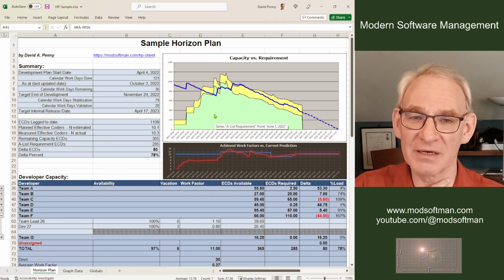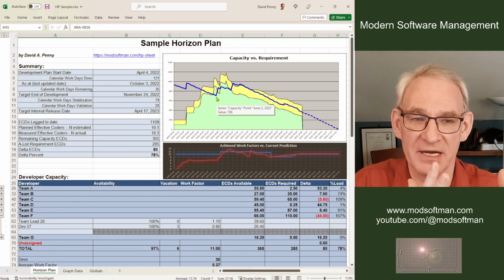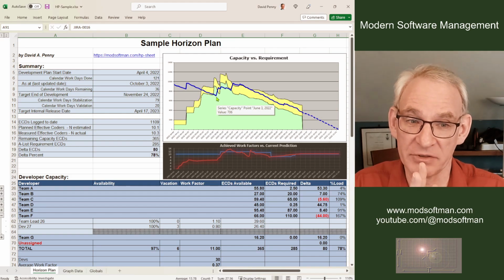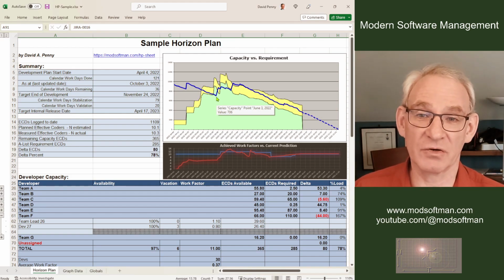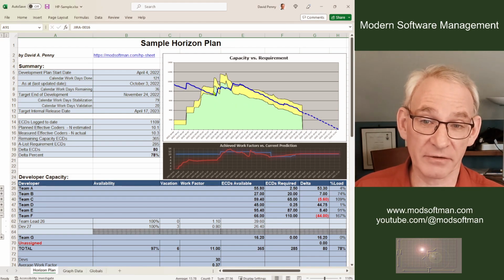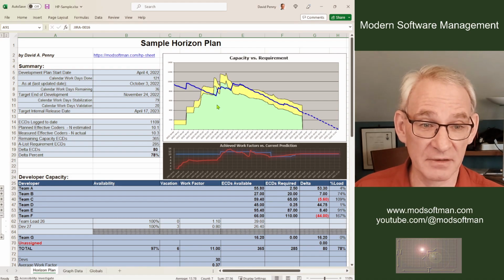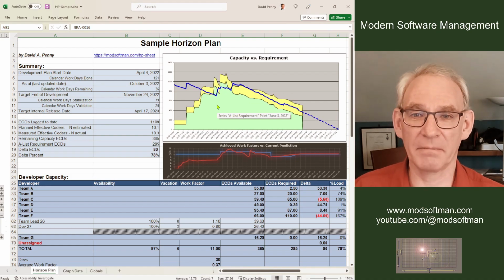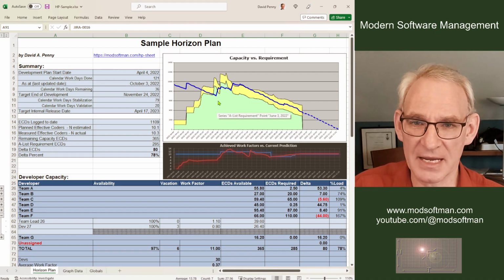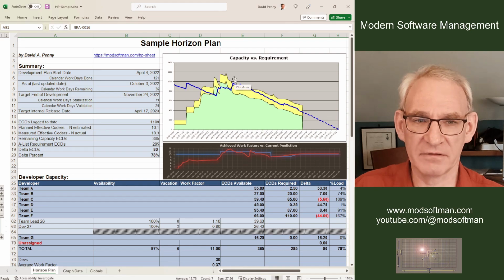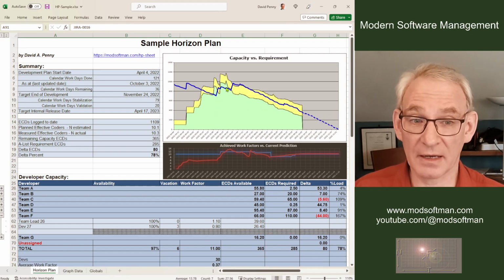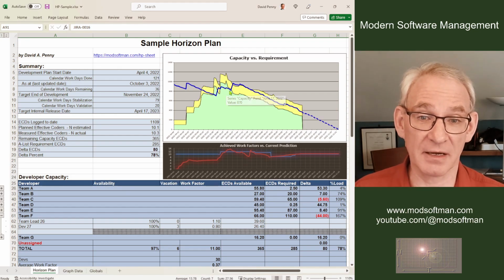Now, as developers, we can be a bit agnostic about that. We can say, well, we don't care. Product management, you want more in it? The time has to go longer. Product management is free to remove things. So rather than moving the date up, another reaction could have been to remove features. And yeah, you'll get the feature the next release rather than this release. But that's not slipping a date. And you have to be careful to communicate that. That is proactively moving dates at the behest of product management.